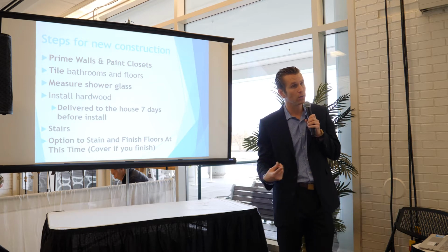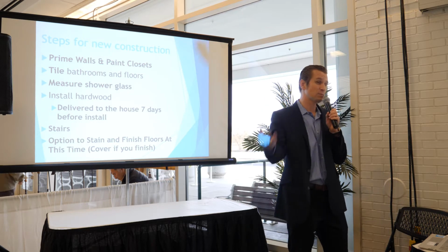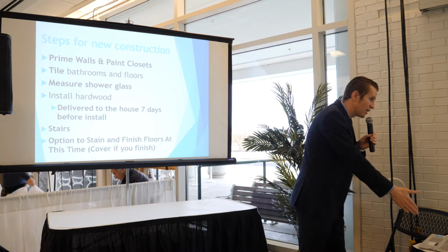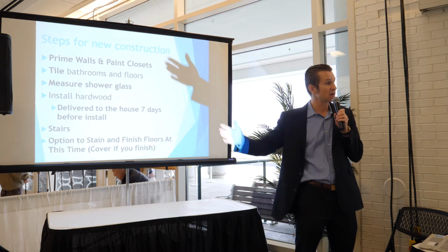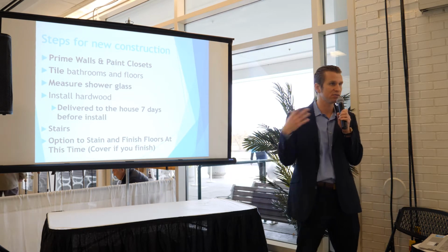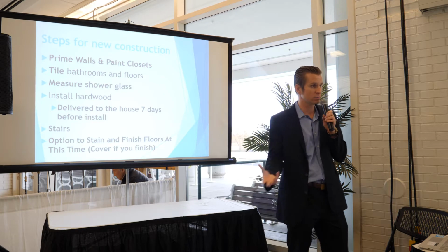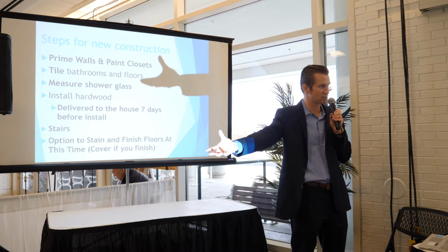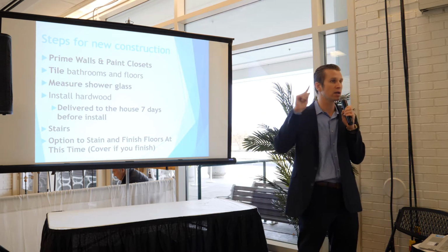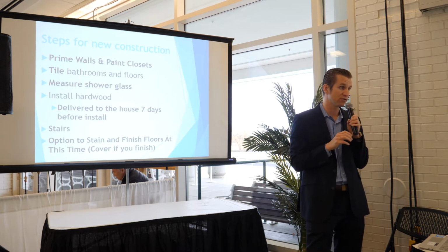If you're in the city of Chicago, we order our inspections 3 to 6 weeks before the actual inspection happens. Because you may have the work done, and then the inspector can't get out there for 4 weeks. This delays the project, and it also helps us keep the subs' feet to the fire, because we say you're not going to get paid until this passes inspection, and our inspection is ordered on this particular date. So this is how we keep everybody on time to make sure that the project is done in the timeline that you originally planned.